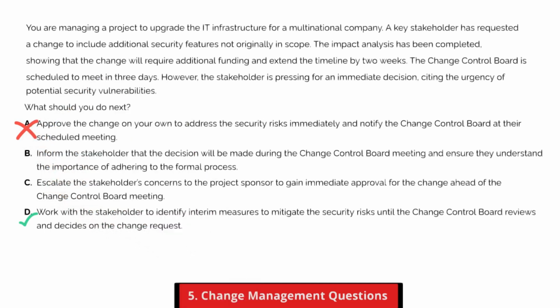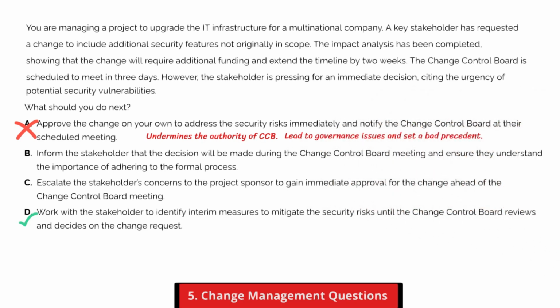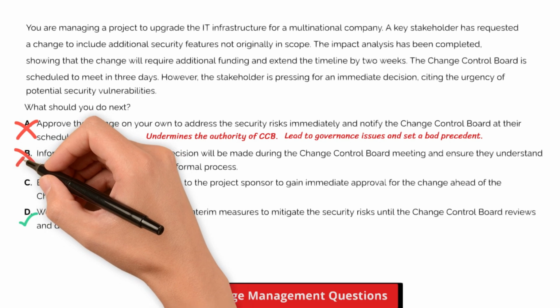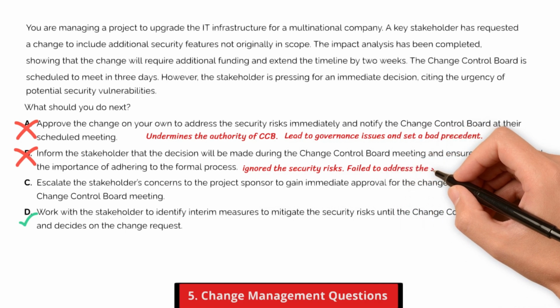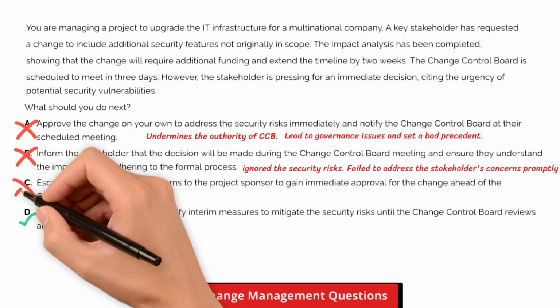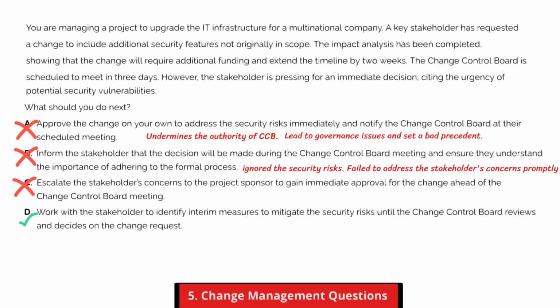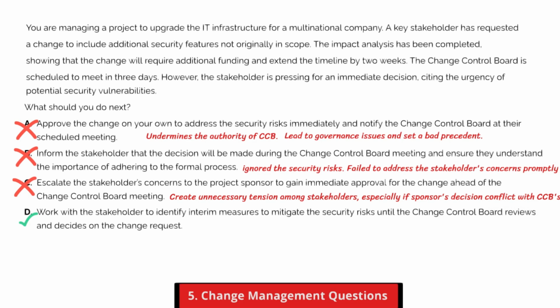Option A, approving the change independently undermines the authority of the Change Control Board and bypasses the established process, which could lead to governance issues and set a bad precedent for handling future changes. Option B, while waiting for the Change Control Board meeting adheres to the formal process, it ignores the urgency of the security risks. Failing to address the stakeholders' concerns promptly could damage relationships and potentially expose the project to vulnerabilities. Option C, escalating the issue to the sponsor for immediate approval bypasses the Change Control Board and may create unnecessary tension among stakeholders, especially if the sponsor's decision conflicts with the Change Control Board's eventual review. Okay, let's move on to the next one if you are ready.